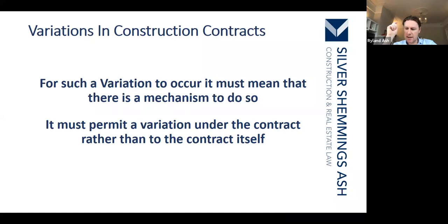Rock Advertising and MWB. This is a Supreme Court case from last year, I believe, where it was decided that if a contract includes a provision that says there cannot be an oral, verbal amendment made to this contract, then if you subsequently come to a verbal agreement to amend the contract, that will not have any effect.